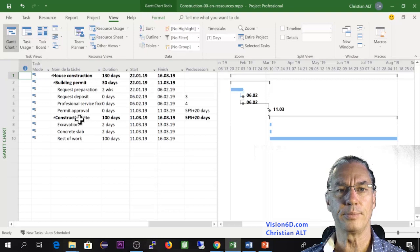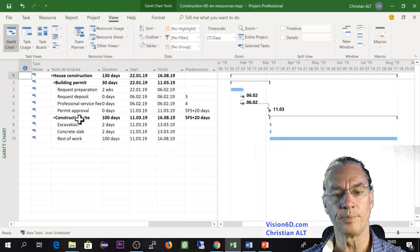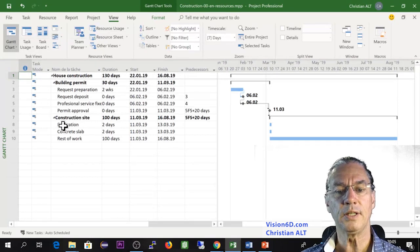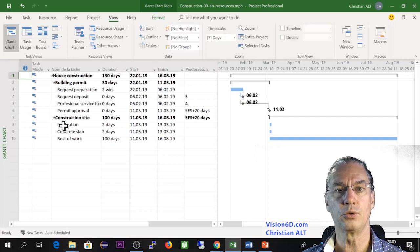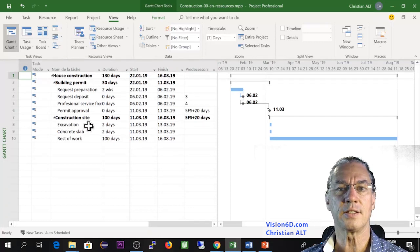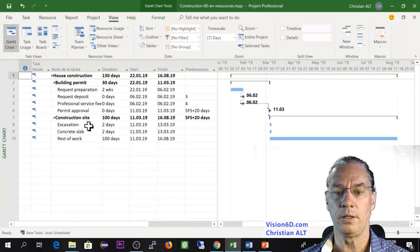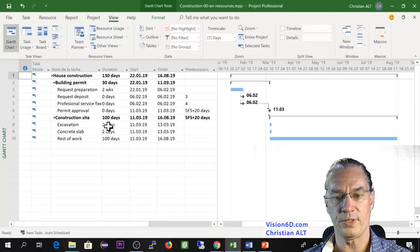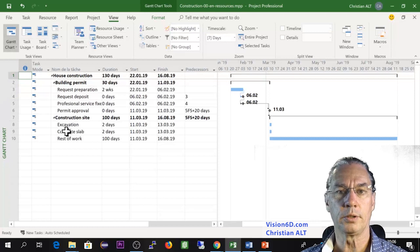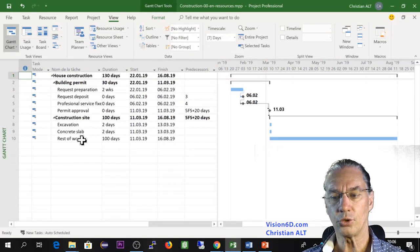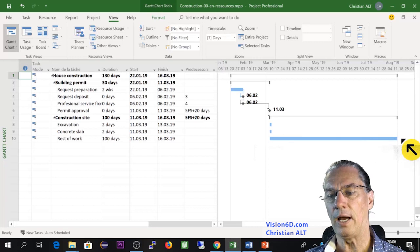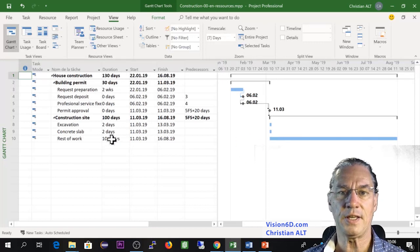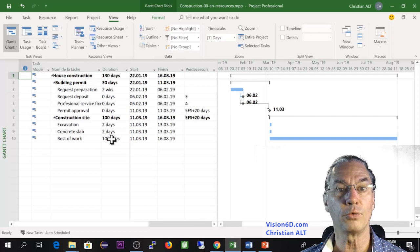The other step that is also interesting to me here is the construction of the basement in which we have first to do the excavation with some excavator or mechanical system to remove and move earth. And then we build the concrete slab. The rest of the work you see here I do not detail it but I have set it with 100 days of work.